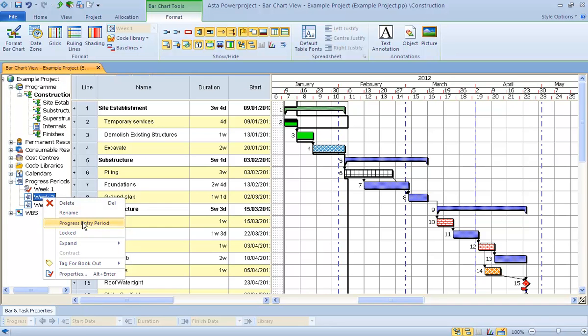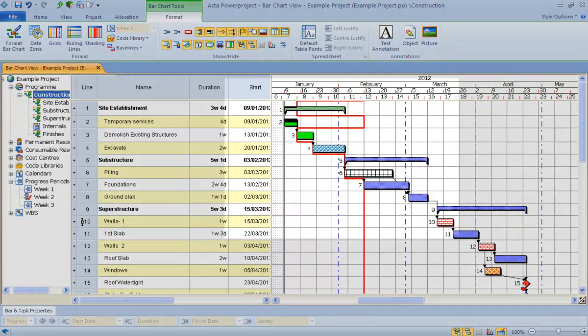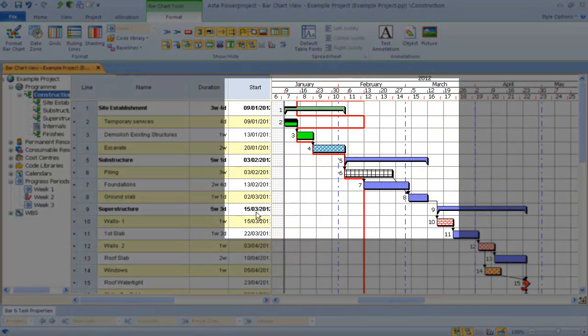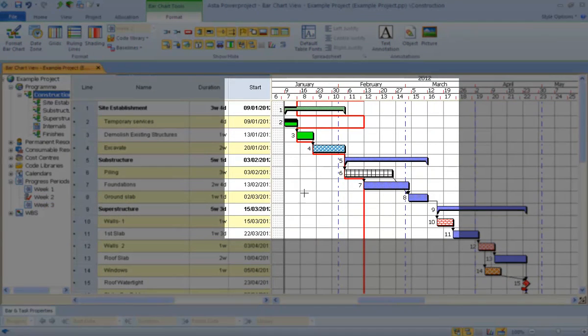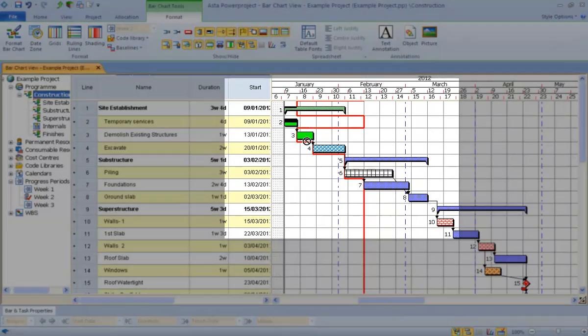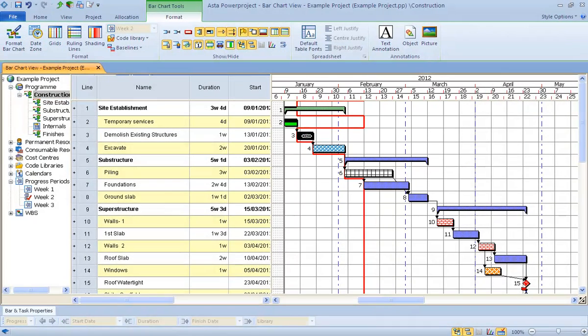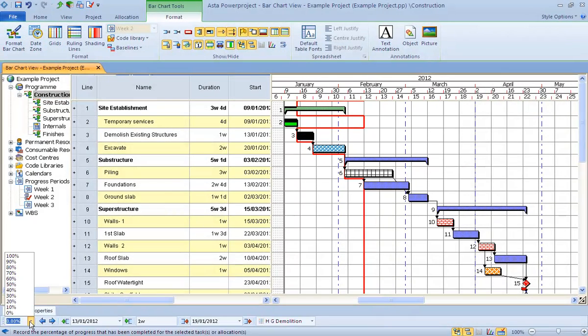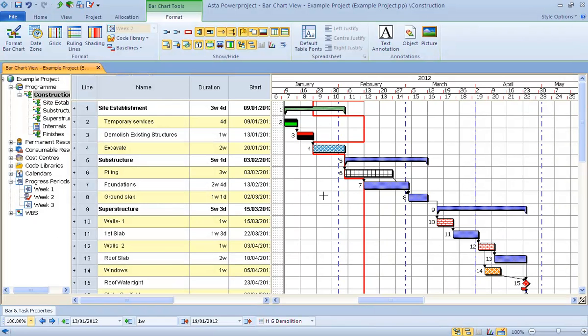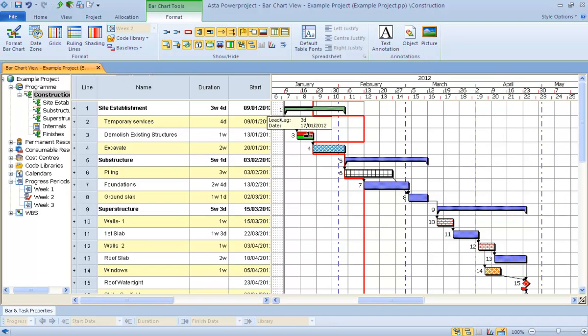Historically, that line there would stay black. But now, the software automatically readjusts this line, so it now comes from week two. And indeed, if I was to go to my task here and change it to 100%, I'm now adding progress in from week two.